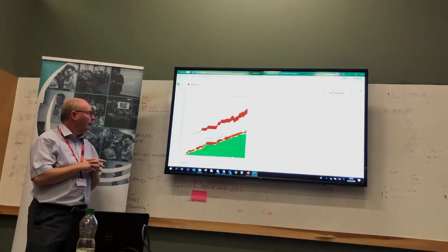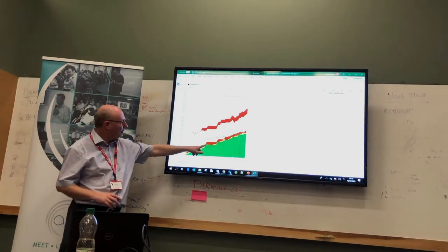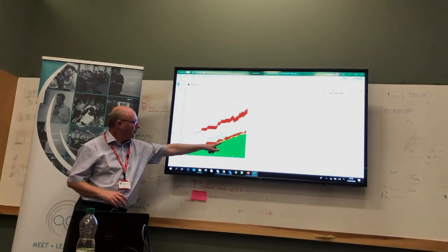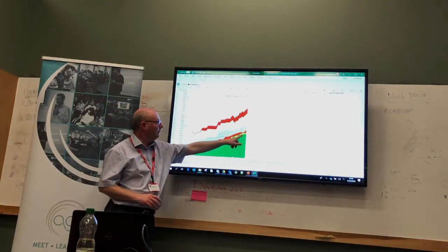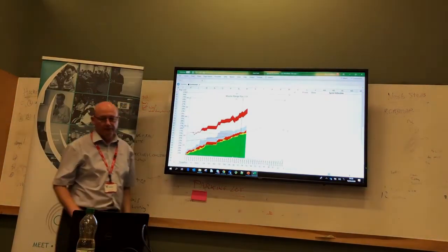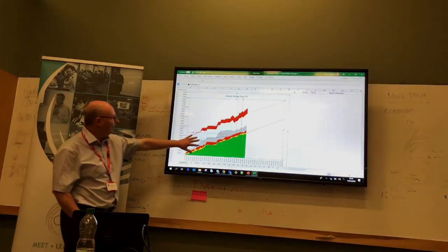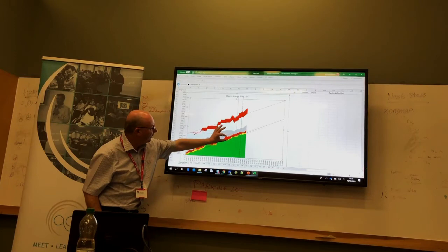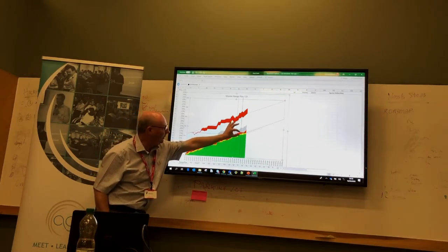Yes, they kind of do, because when you don't have WIP limits, you get these big departures, big jumps like that. I mean, they still do it. They have these big departures because they end up getting a big chunk of work in progress, and then they finish it, and then they make another one, and then they finish it, and they make another one.